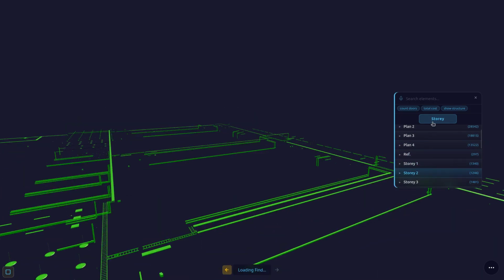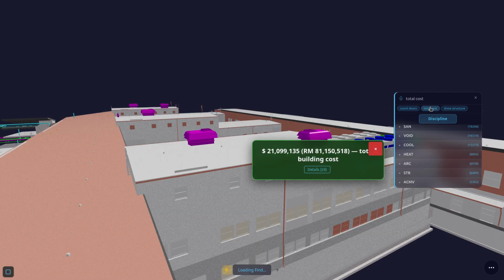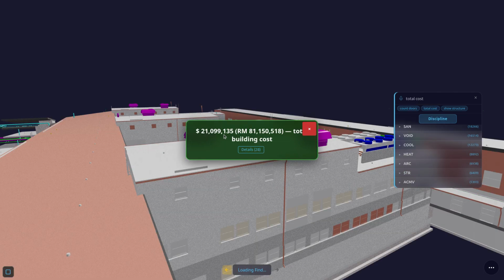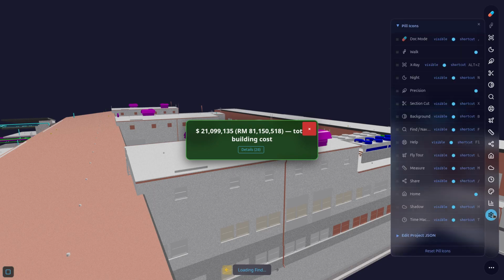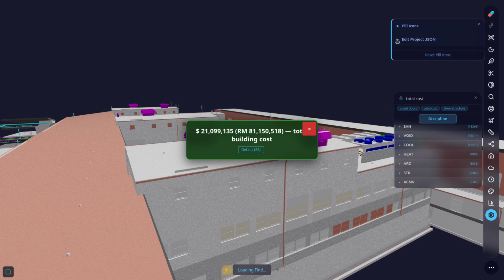So you get the idea that when you find things, you can find out what's the total cost. Why we can do this, 200 million, yes, no? Is because we have all these properties, these elements, we call it assets, or we call it products in the ERP sense. And we have a rate table, which is this costs what, this costs what. And it is in an editor.